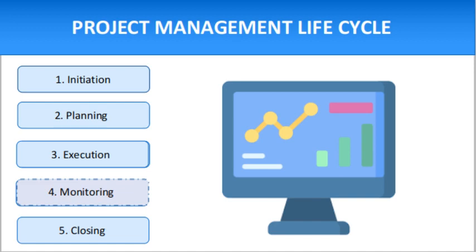As a project manager, you will be monitoring and controlling a project in some way throughout all of the project life cycle phases. First, that means ensuring you capture the data, usually derived from timesheets and reports in your project management software, to track progress effectively against the original plan. Second, it means taking the data and comparing task completion, budget, spend, and time allocated in the original plan. By comparing the actual against the plan, you can establish whether or not you are hitting the objectives for timeline, cost, quality, and success metrics.